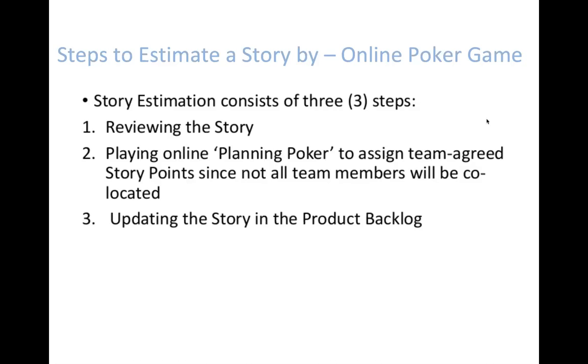Once they accept, for example, that we need 5 units, we can discuss with the team and the product owner whether there is a possibility to break this user story into further story points, or maybe different user stories. Then it's really good, because working on a small user story is really good with respect to our delivery aspects.